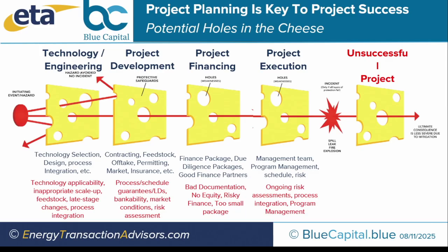One of the most useful documents we do for companies are risk assessments. Risk assessments are a living document. They don't just die after you've made them. They continue on with your company. They're part of your auditing process. You update them as you mitigate your risks. I think they're a really useful document for companies.